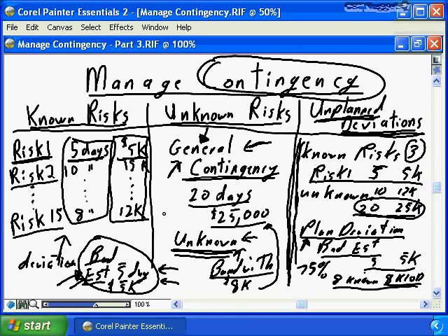The big thing you have to watch is that you're not consuming contingency early in the project to hide schedule deviations, that you are reserving the risk events, the risk contingency, for later in the project at the 75% complete level, when it is truly known that the project is likely to succeed and that it is acceptable to begin to consume contingency for simple planned deviations, as opposed to reserving the contingency for the actual risk events.